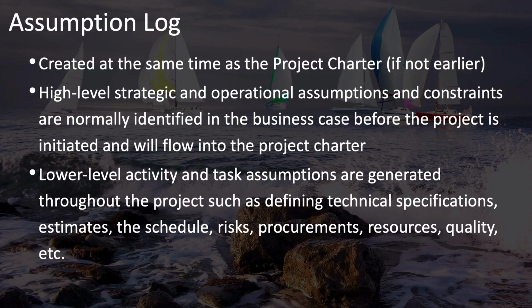On some projects, it has been, and on others, we've had key stakeholders that have a really hard time making decisions on the user interface design. You may assume that the data security requirements won't change in the middle of the project. You may also assume that vendors are available for key components, and so you start a process of procurement only to find out later that the vendors that you hoped would be there simply aren't.